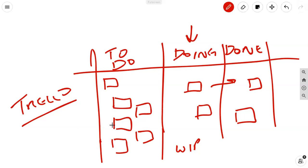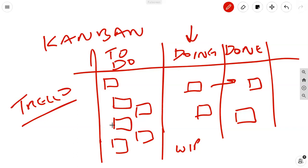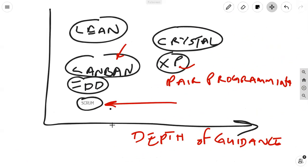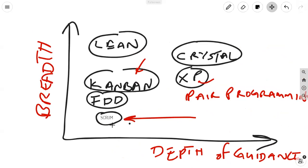I introduced this to my director of photography. And he has since been using this, using Trello, a well-known software program that does this electronically. So it's a very simple concept. Now, going deeper, there's a lot more going on in Kanban. The word Kanban is literally translated as visual sign or card. So it's a signal, pretty much. Kanban in lean manufacturing is a system for scheduling inventory control and replenishment. Unlike most agile approaches, the Kanban method does not prescribe the use of time boxed iterations. Iterations can be used within the Kanban method, but the principle of pulling single items through the process continually and limiting work in progress to optimize flow should always remain intact. Let's not get carried away with Kanban just yet because we really want to hit Scrum.